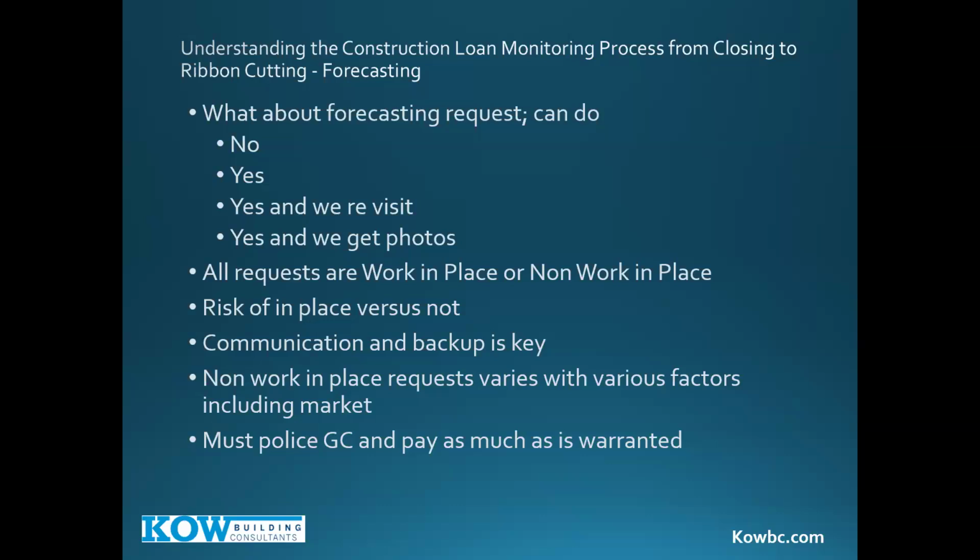What about non-work in place? Okay, so we really break everything into 2 categories: work in place and non-work in place. Work in place would be, you can see it, touch it, feel it, it's there. Concrete's installed, windows are there, paintings, door hardware, a boiler's set, roofing is installed. That's on us. That's on the KOW inspector's expertise to opine on completion, quality, plans and code, and recommendation for funding. Work in place is on us, full stop.